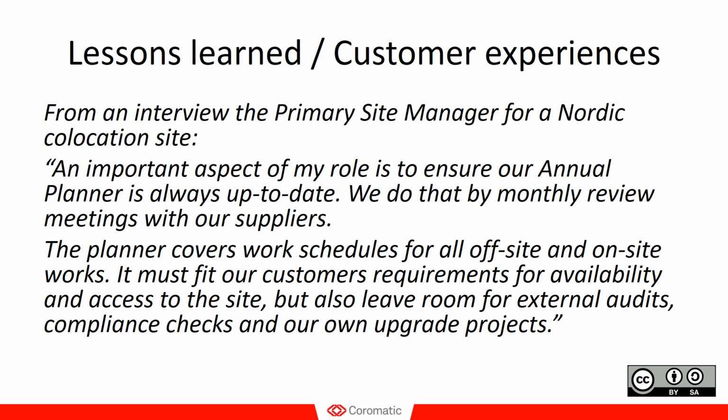And the planner that this site manager uses covers both off-site and on-site works to fit the customer needs as well as the service providers' needs. But at the same time, it also leaves room for external audits, for example, and compliance checks, because these end user organizations often have their own security auditors or quality auditors coming to perform work on site to make sure that everything meets their expectations. And that of course needs to be part of the planner. So even if you can't schedule it as a primary site manager, you need to be prepared that those things will show up and be planned.